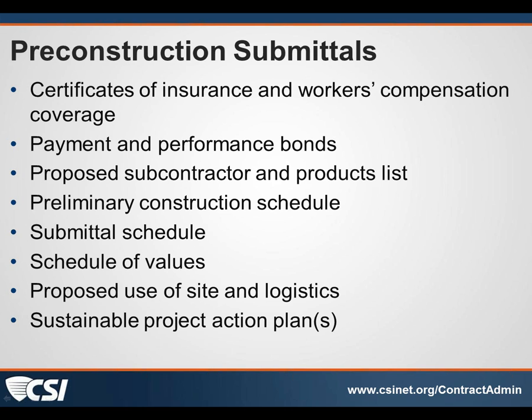So he immediately turned the game around on us to say, okay, your clock started, you got 21 days to get all this back. And by the way, this other box is full of RFIs, because as we were going through our bidding process, we were making questions that we didn't understand. Of course, he didn't share any of those prior to the bid, didn't share them prior to the contract being signed, but now all of a sudden had 35 RFIs in a box, and of course they all say that they need to be responded to ASAP. We got to have these immediately.